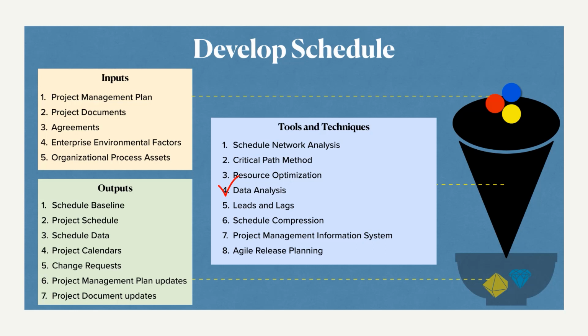So what can be taken as an example here? The what-if analysis. I think we have learned what-if analysis. It evaluates the plan, it questions every activity. What if this doesn't happen, right? We define an activity and then we question it, saying what if the resource goes the other way? I think you get this. And then what else could be used as an analysis tool? Simulation. I think we discussed this before. Monte Carlo analysis. So multiple work packages are calculated, assumptions are added, probabilities are added, statistical tables are used. So that can be used as the data analysis here.